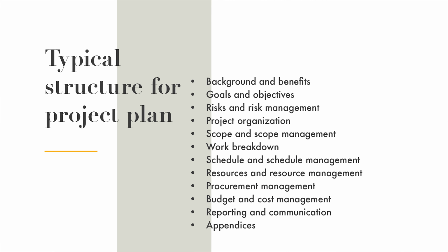Although the project manager is responsible for creating the project plan, the plan is made in cooperation with all major stakeholders. Typically, these include at least the customer, project team, and major suppliers. This figure shows an example of what a typical project plan contains. It can be easily observed that the structure is highly similar to the previously discussed list of project management knowledge areas. As a whole, the project plan provides a common understanding to several key questions. What is the customer need we are addressing? What is the solution we are addressing the need with? How are we building the solution? And what is the team building the solution?